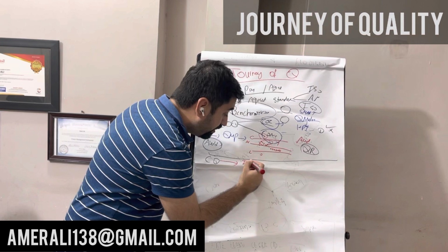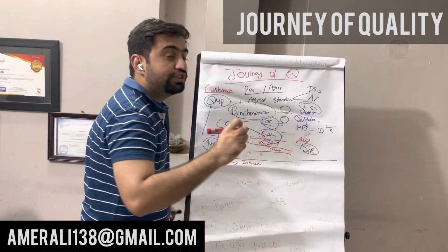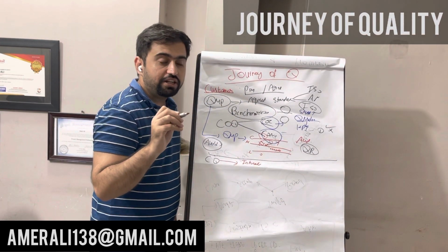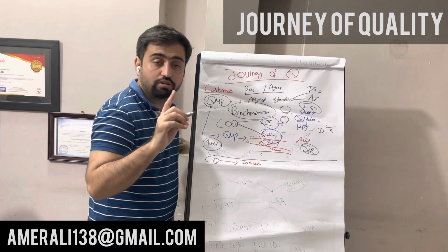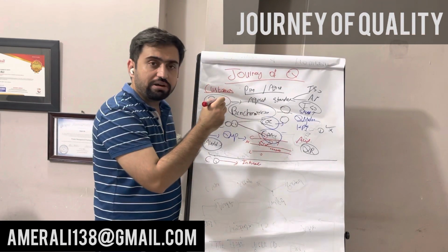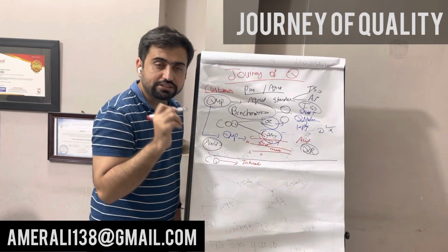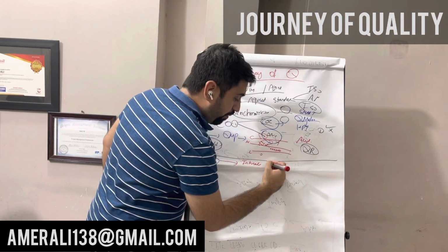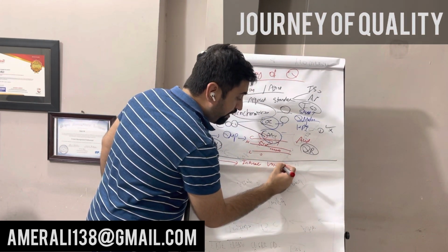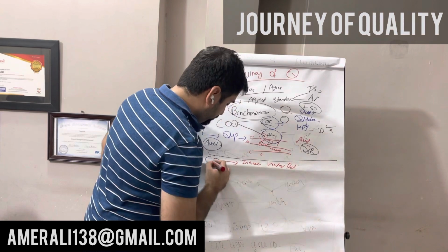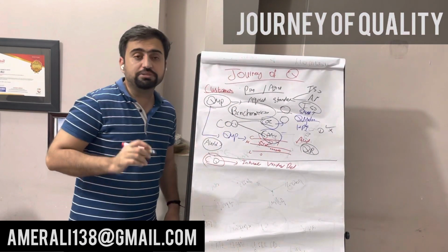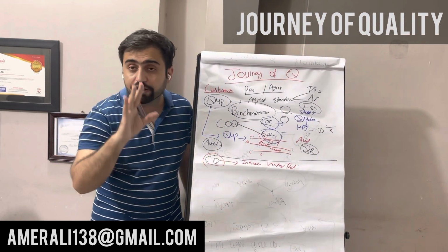Very important: the client is not involved. We check internally whether the deliverable meets the standards or not. We are only checking against the quality management plan. If the deliverable meets the standard, the deliverable gets approved, and we call it a verified deliverable. So when a deliverable has been checked by quality, we say verified deliverable.